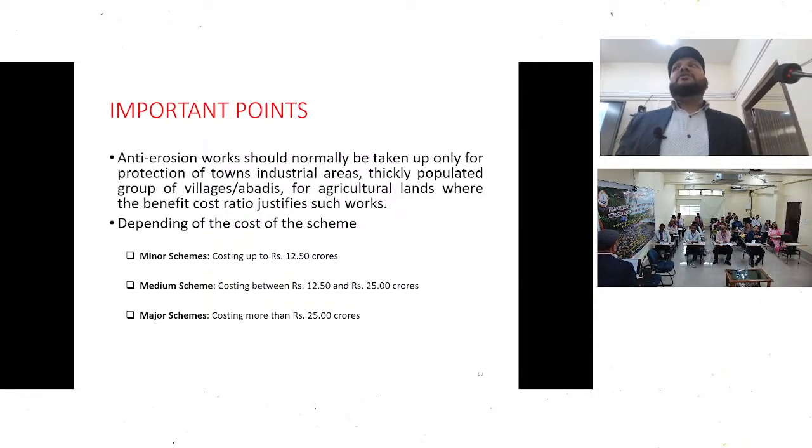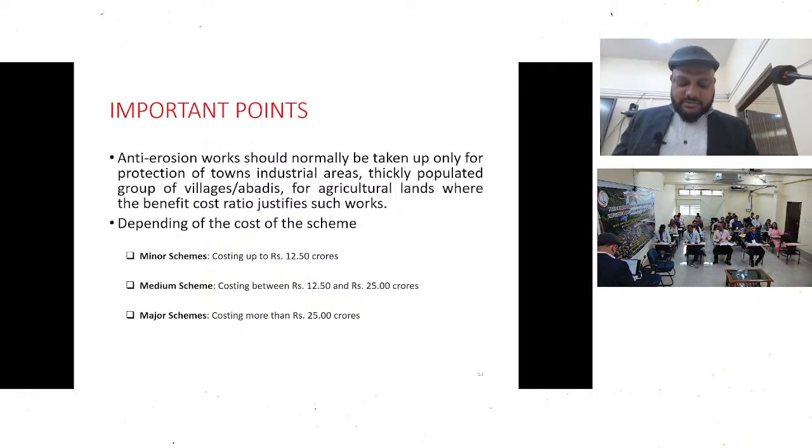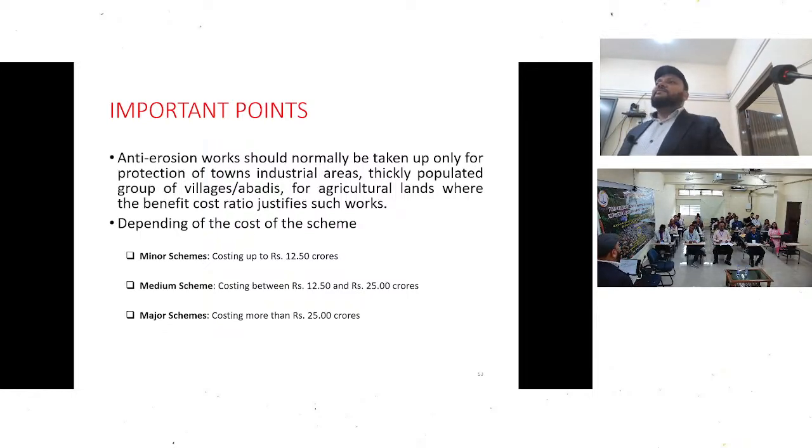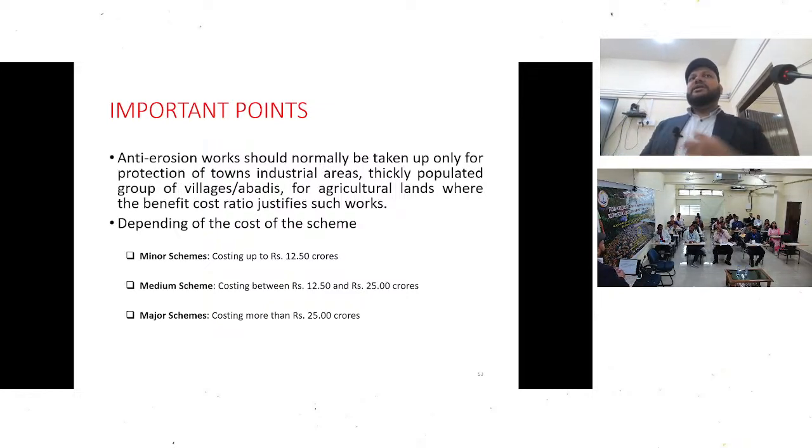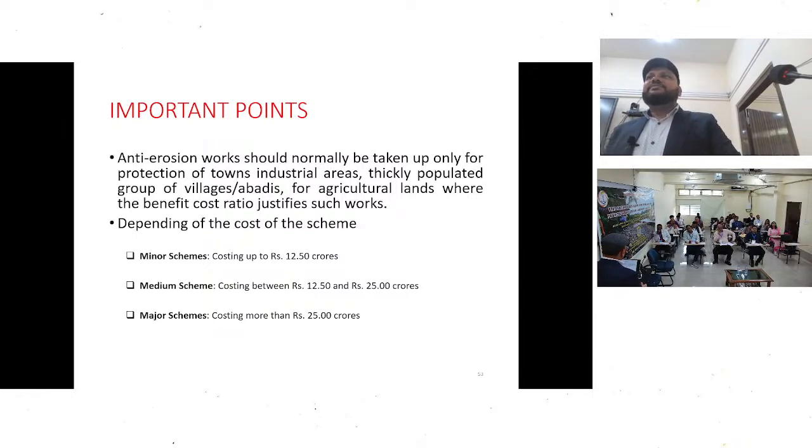Now the central government is funding, because if we want to take any funding from the ministry or central government, then we have to plan our DPR accordingly. If the state government wants to do it with their own fund, then it's okay. But if we want funding, then there are a lot of steps. We have to classify the schemes, whether it is a minor scheme. If it is a minor scheme, then the state government has lots of delegation of power, meaning they can give investment clearance by themselves.